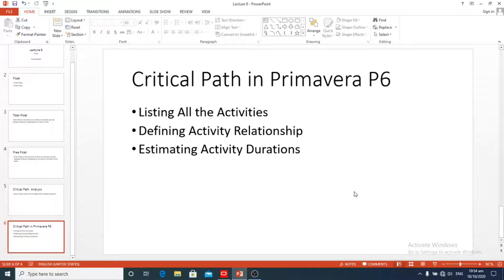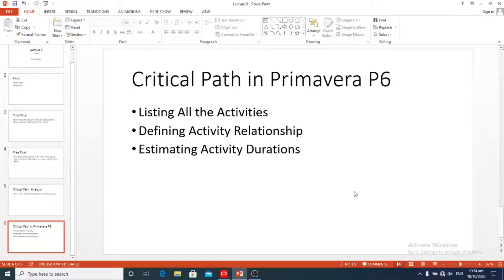Activities that have total float values equal to or less than zero are critical. Critical path analysis is one of the most common scheduling techniques in order to determine the activities on the longest path of the project.